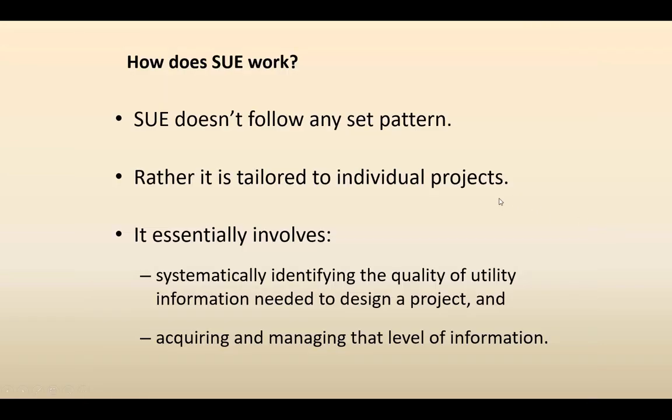So how does it work? First of all, SUE doesn't follow any set pattern. There is nothing that says this is exactly the pattern which has to be followed for SUE. There are guidelines. You have to go, for example, in the increasing order of accuracy, that is, the higher quality levels are to be done, but you have the flexibility to make modifications depending on where you are working and what is the requirement of the project. So it is tailored to individual projects.